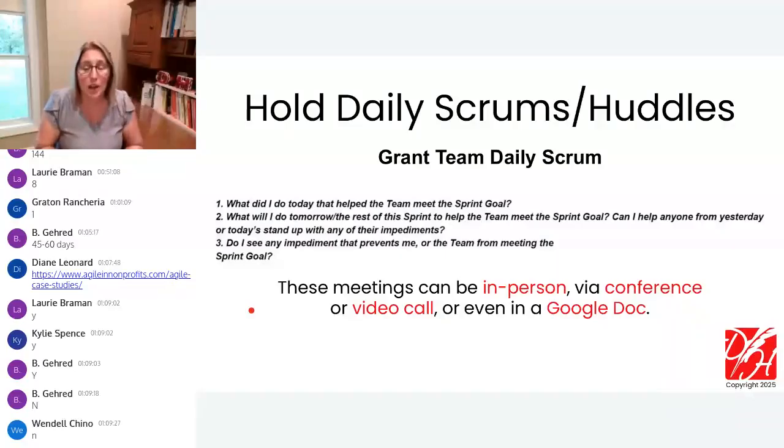How are we doing on our progress related to the narrative? We can quickly check in on our progress towards the goal, maybe using our project digest, maybe looking at our backlog of our broken down items. But the main intent of those 15 minutes was to say, related to our progress, our big goal is to submit early. Are there any impediments that are going to keep us from doing just that? The big, broad, open-ended question, you want to hear anything and everything.